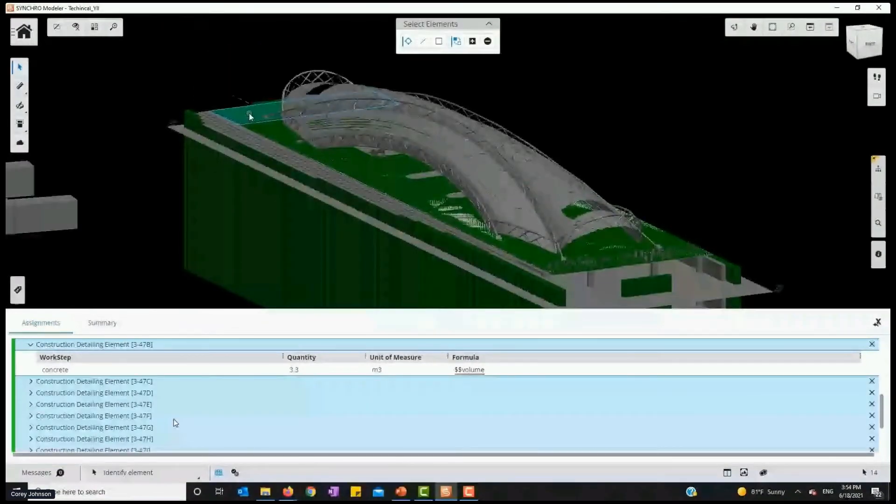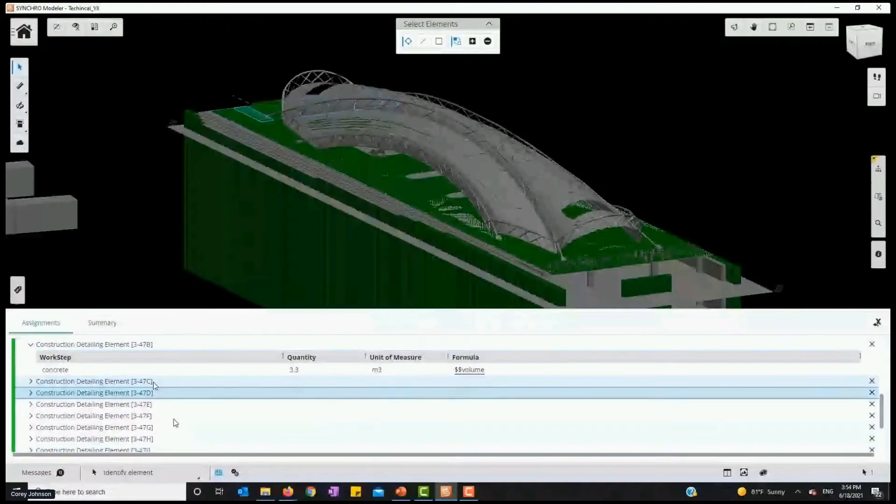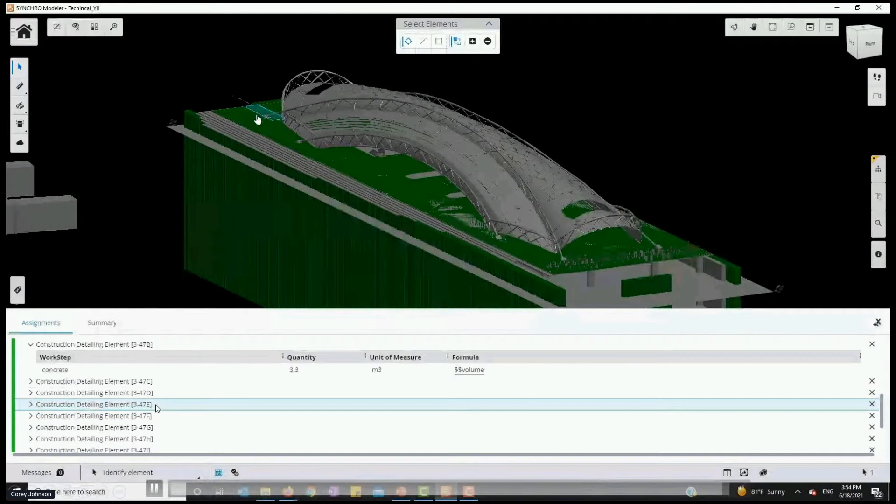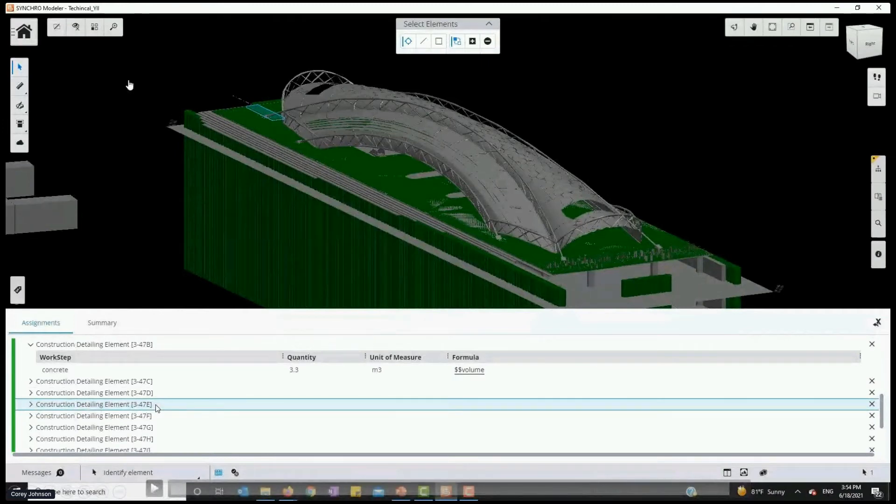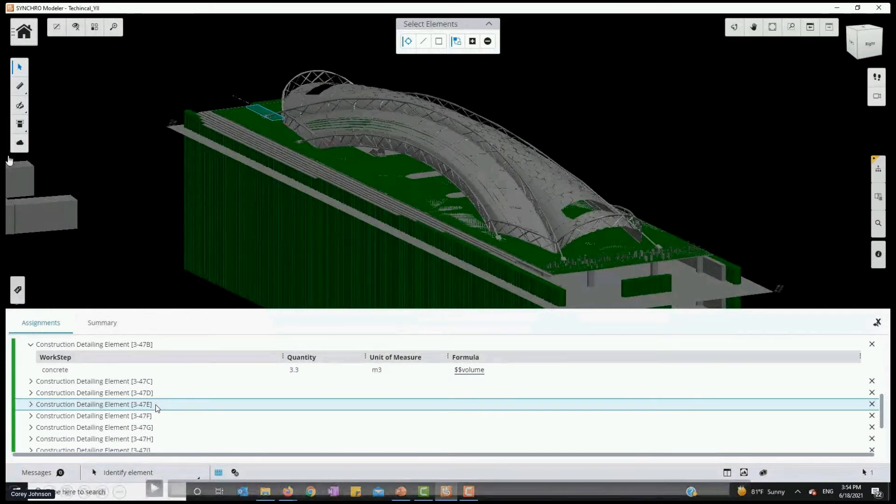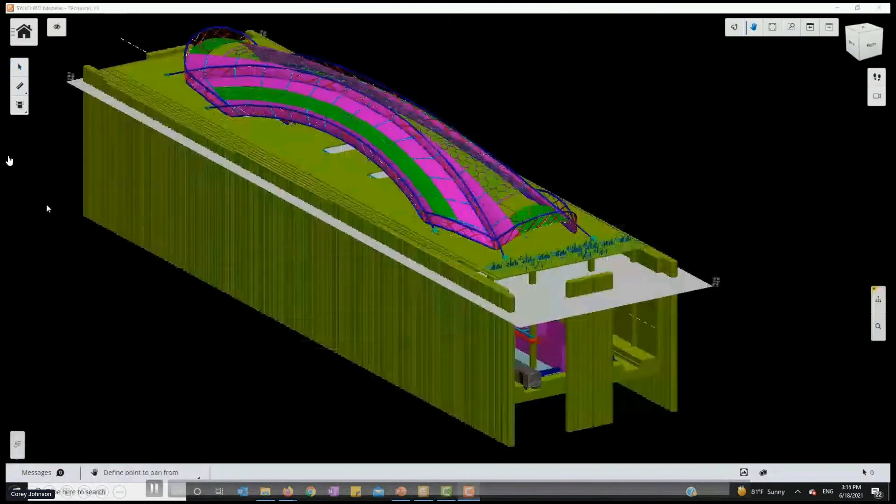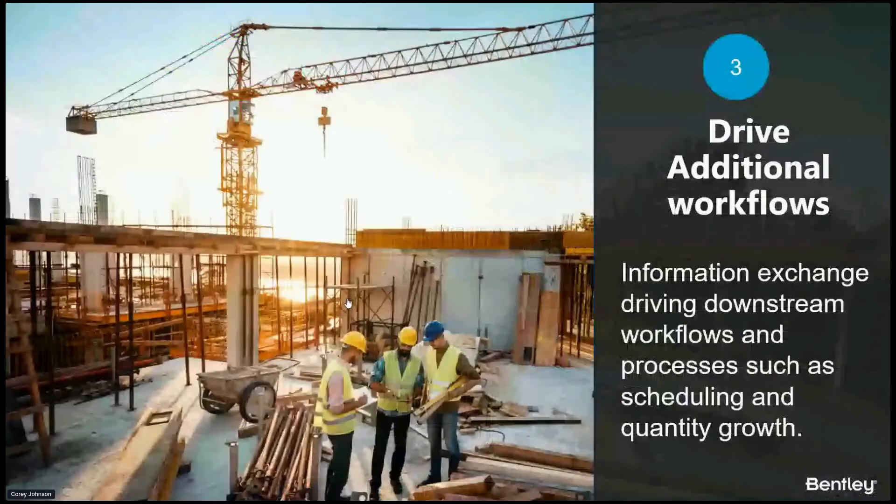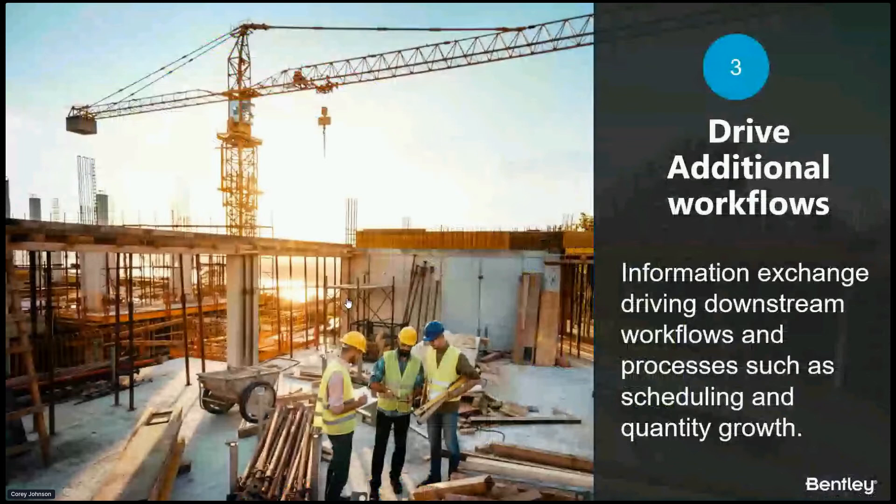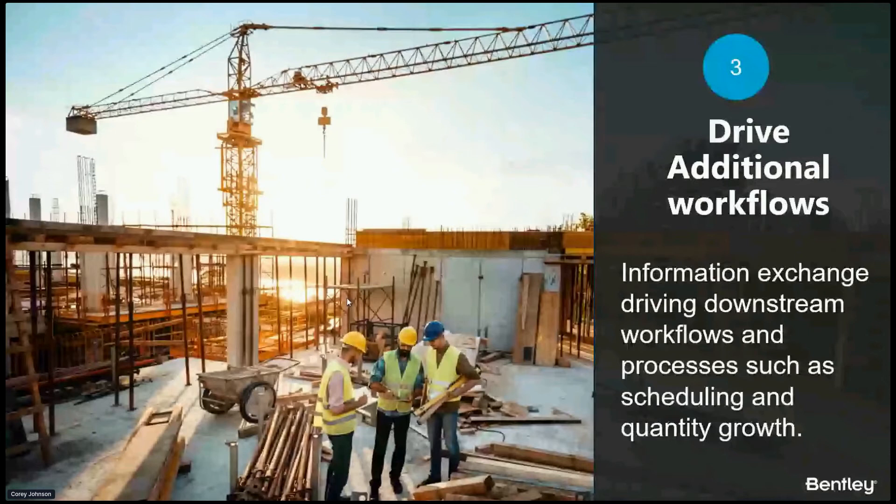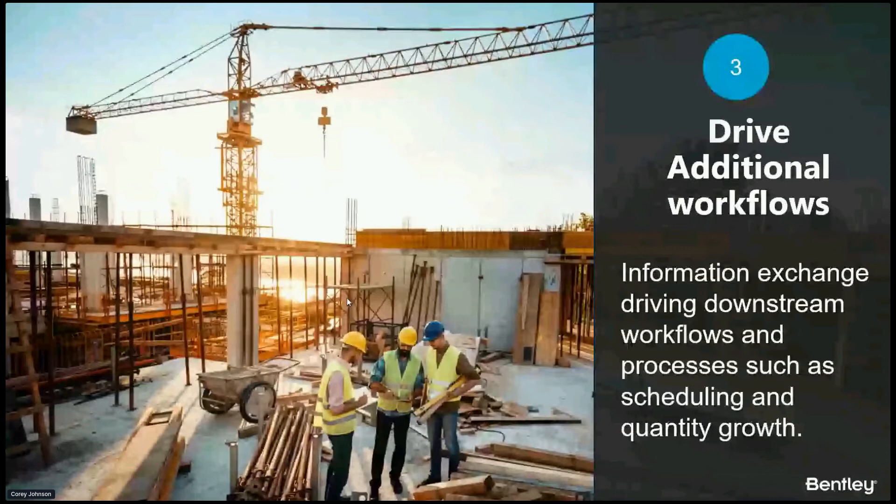Now when we do this, we're not done with those individual pieces. They can be used elsewhere because now we know the production rates, we know the accurate quantities, and we kind of have it broken down how we want to stage this. So we saw that we can get the estimate out to an Excel spreadsheet, and we can conform that export to be whatever format you need to feed into your estimating system. Because I know that those have much more robust - we're focused on giving you accurate quantities and putting your intelligence to this.